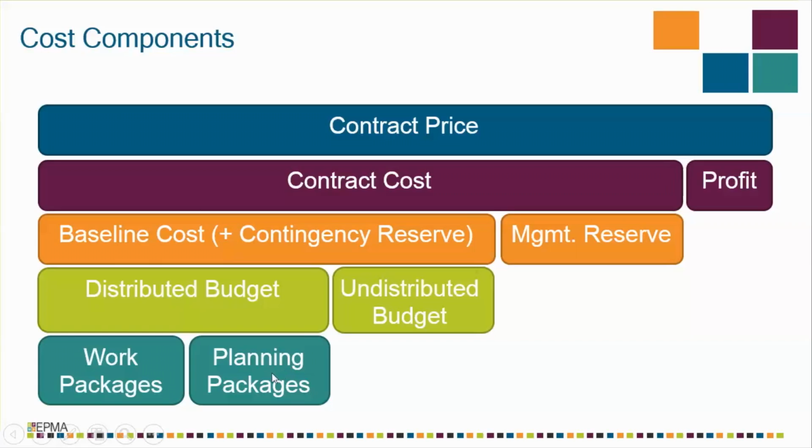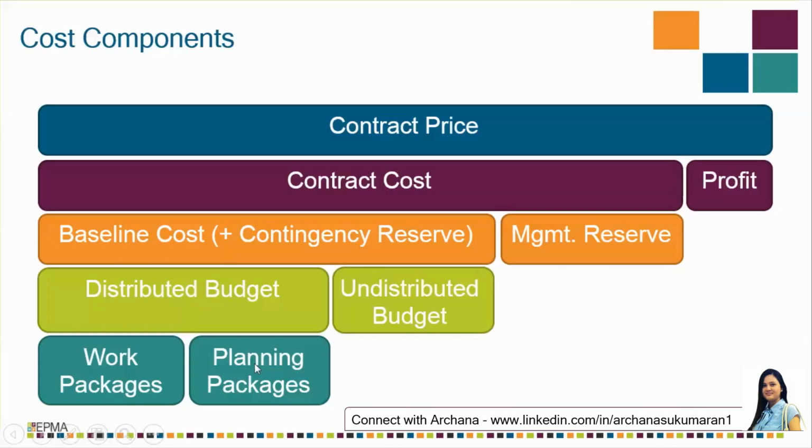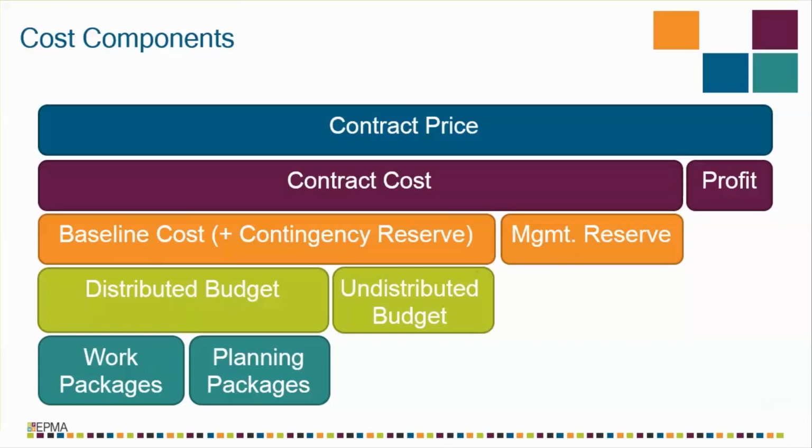A planning package actually includes efforts that will be eventually identified as separate work packages. There might be situations where you know that in order to perform a particular task, you have a few set of activities, but you're not clear with the requirements or details of the tasks. Those tasks can be classified under planning packages.